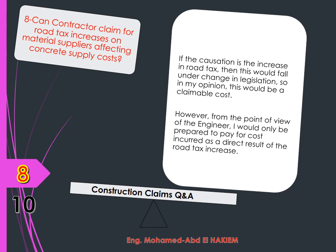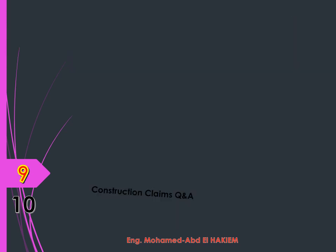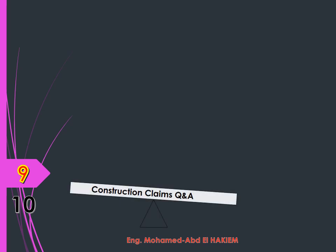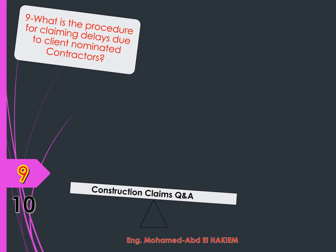Question 8: Can a contractor claim for road tax increases on material suppliers affecting concrete supply costs — is this a contractor's risk, or is it an employer change in legislation? Answer: If the causation is the increase in road tax, then this would fall under change in legislation, so in my opinion this would be a claimable cost. I would only be prepared to pay for costs incurred as a direct result of the road tax increase.